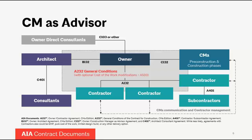The contractor — whether a general contractor or multiple prime contractors — will engage subcontractors to perform various portions of the work. The key difference here is that, unlike in the design-bid-build scenario, in the CM as advisor scenario the owner engages the CMA to provide services during both pre-construction and construction phases. The owner holds the contracts with either a general contractor or multiple prime trade contractors, and the CM has some oversight and contract administration responsibility on behalf of the owner.